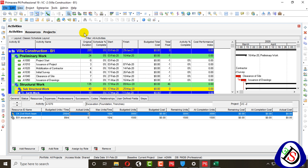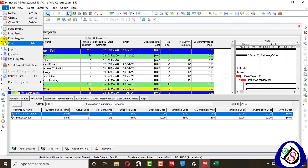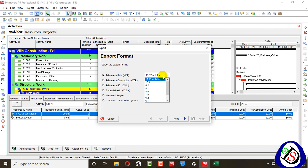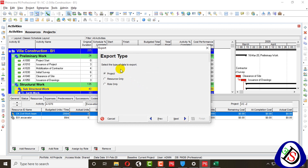Today's content is on how to import and export files and how to make cost loading. I will export my project using the arrow-up button. Here we can see the export format — we are using version 19.12, the latest version, so we will export in 19.12. For export type, we can export resources and roles, or a full project. If we need only resources in another database we can select resource, or only roles if needed.